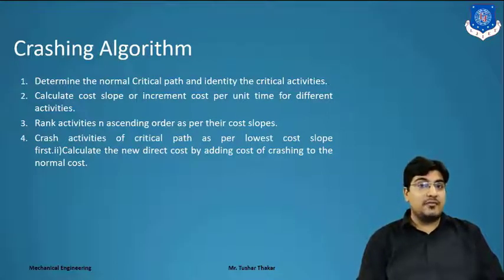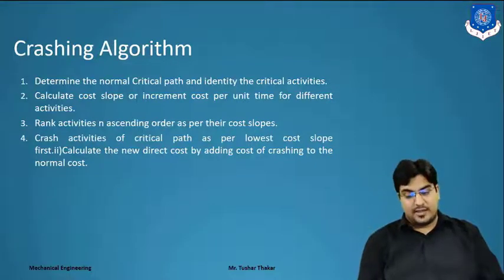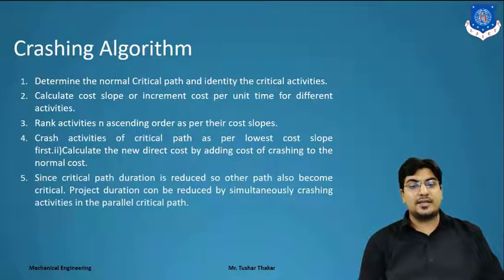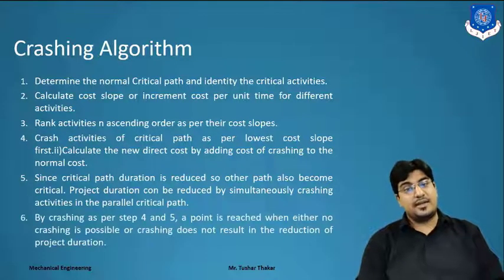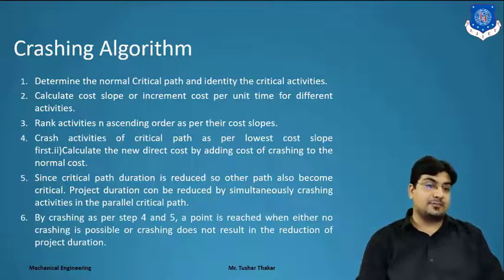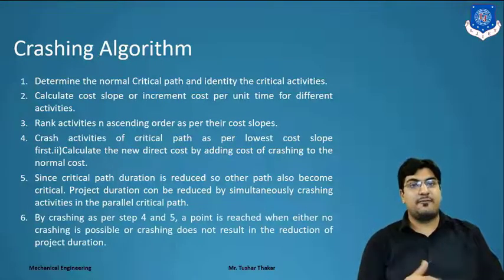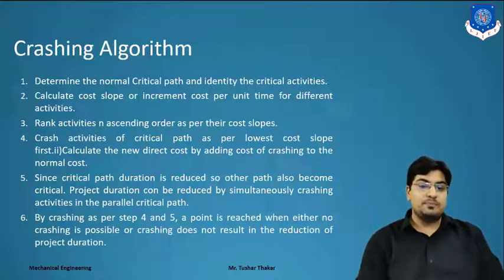We have to apply crashing at the activities that lie on the critical path, the critical activities. Next, since the critical path duration is reduced, other paths may also become critical. It is possible that we get a parallel critical path, so we simultaneously crash that parallel critical path also. After completing steps 4 and 5, we repeat until either no crashing is possible or crashing does not result in a reduction of project duration.